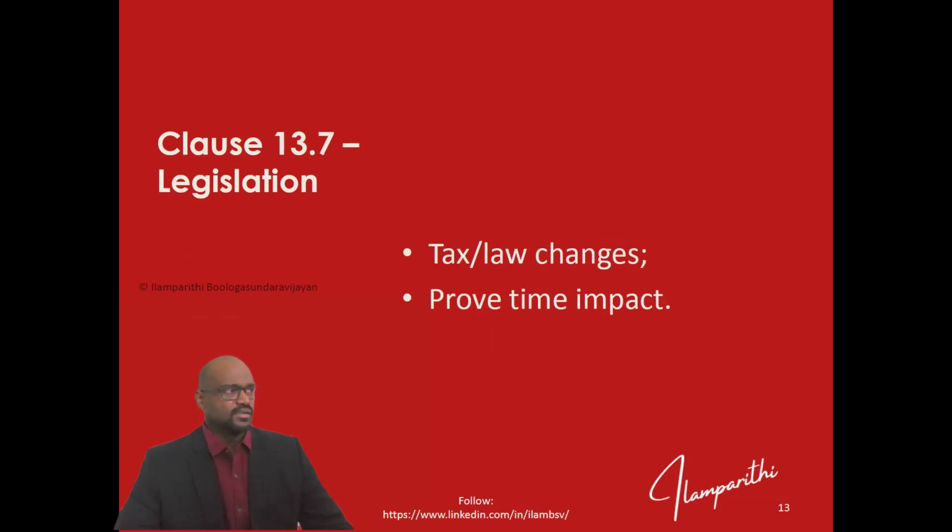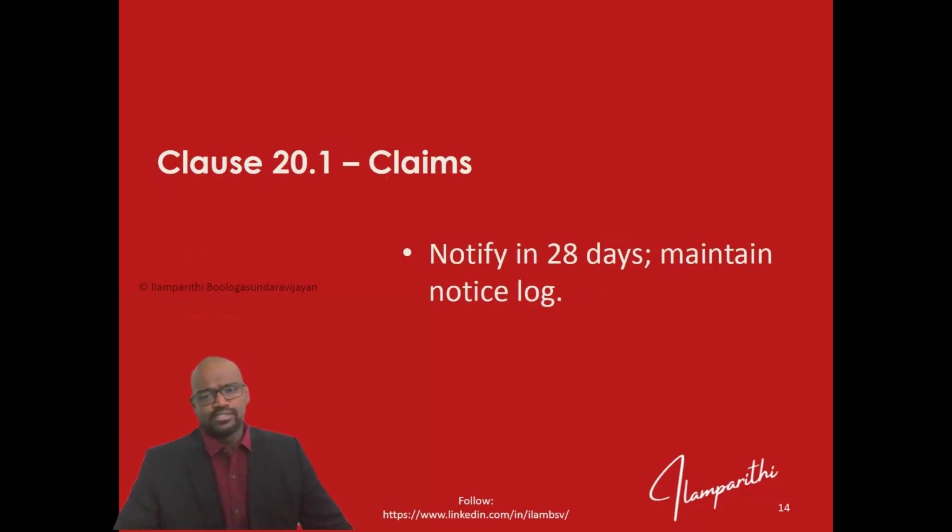Class 13.7, legislation, that is change in law, change in taxes and structures, will definitely have an impact on the cost and time, like we said earlier. So prove both the time impact and the cost impact. Class 20.1 is also a very popular class because it directly deals with the claims. Mostly people forget about the notifications for the claim. So notify within 28 days, otherwise you will lose your entitlement under FIDIC 2 for the claim. So maintain a separate notice log for the claims.